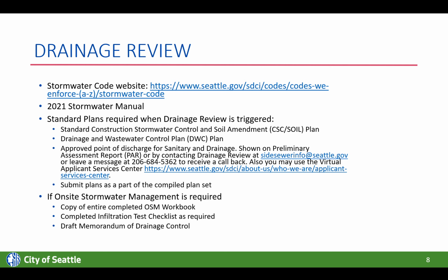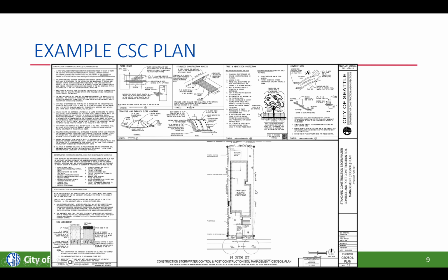If on-site stormwater management is required, a lot more of this detail will be in the 1,500 square feet new and replaced hard surface video, but we'll need the on-site stormwater management workbook, an infiltration test if it's required, and a draft memorandum of drainage control. So I'm just going to look at a couple examples of what we need to have submitted if drainage review